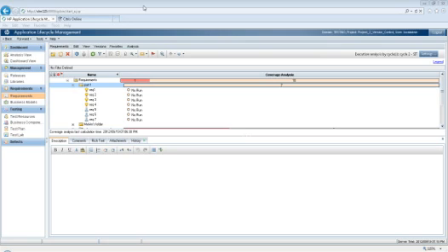So what you do with the requirements in here is exactly that. You link requirement 1 to requirement 10, or vice versa, and whenever something changes, say you link a defect to requirement 1 and then comment that this requirement has changed and needs to be retested, then automatically you will receive a notification for requirement 10 saying, listen end user, requirement 1 has been modified, please go and check what's going on.